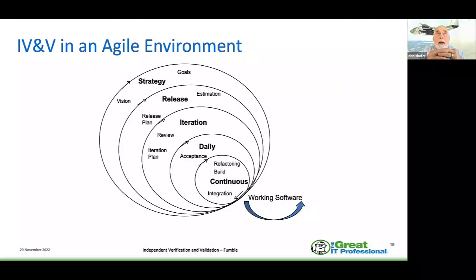The one thing that you end up with in an Agile environment is verification and validation becomes assumed. And you start taking it that I'm going through these iterations, that I've done the work, and obviously I've verified what I need to have done. That is not always the case. And within the Agile environment, you have to specifically build in your IV&V points.